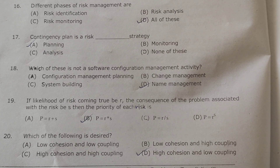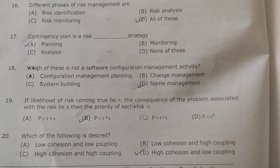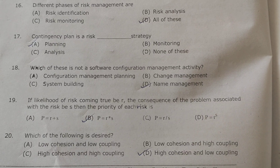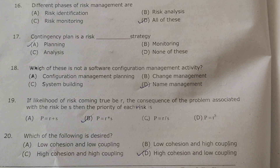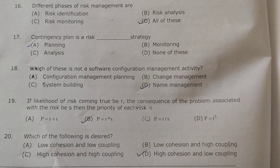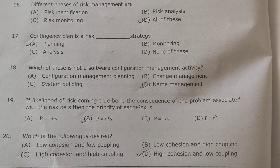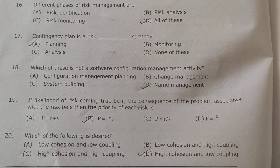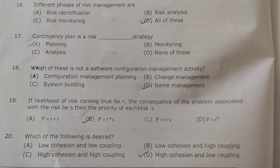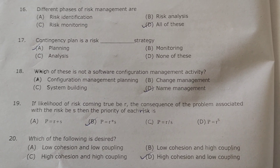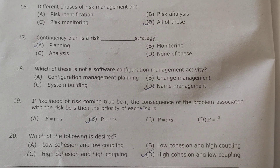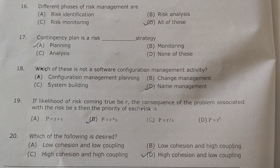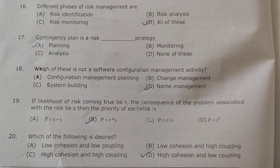If the likelihood of a risk coming true is R, and the consequence of the problem associated with the risk is S, the priority of each risk will be the product of these two. So the correct option is: priority = R × S.